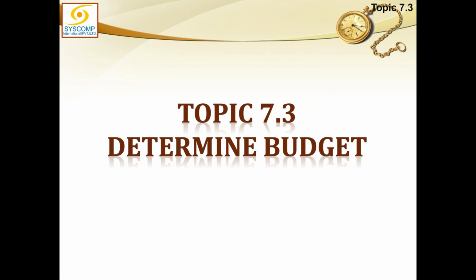So, how close the project manager's estimate is to this estimate is what matters for budgetary people to decide whether it is good enough or not. And what is their limit of acceptance? The project manager's estimate should remain between minus 10 and plus 25%, and if it is so, they will be all right with it.